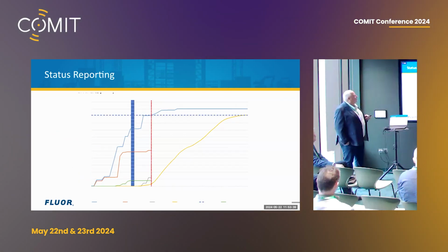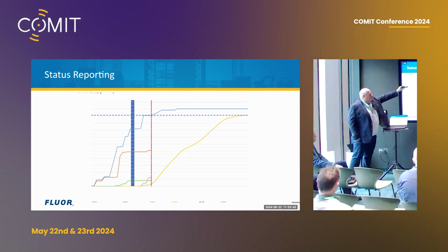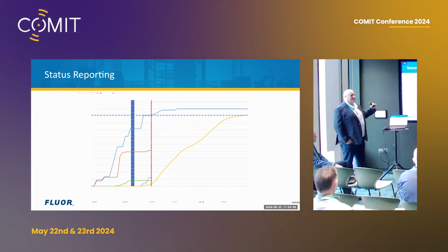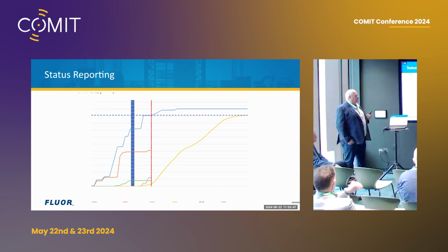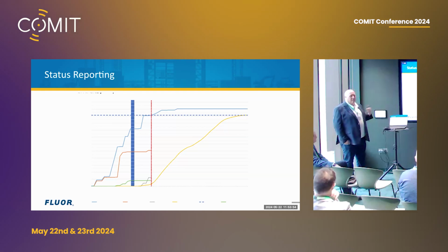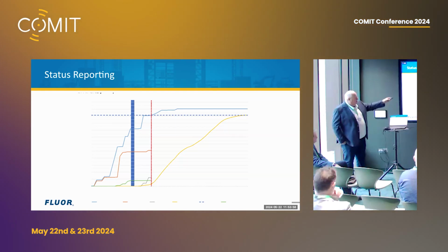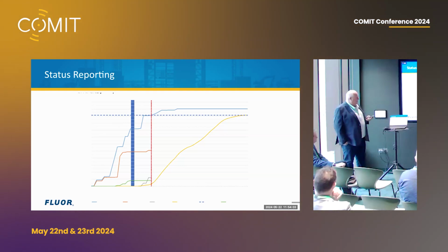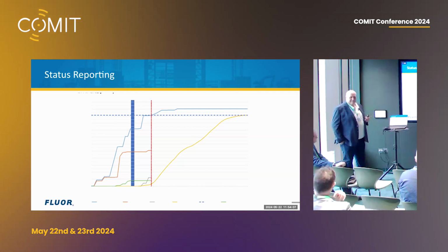Oh, that didn't come up. But what that's shown was that the blue dotted line across the top was our estimate. But actually, when we started releasing this from engineering, our quantities went up. So we could foresee the quantities going up, so we could demonstrate what they were. The solid blue line was what we were going to release. Of course, engineering in the orange started slipping, as they do. They found problems, it slipped.